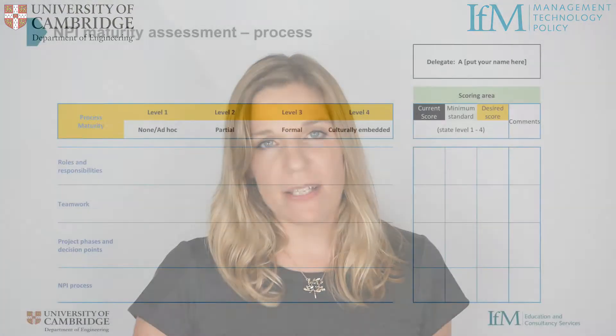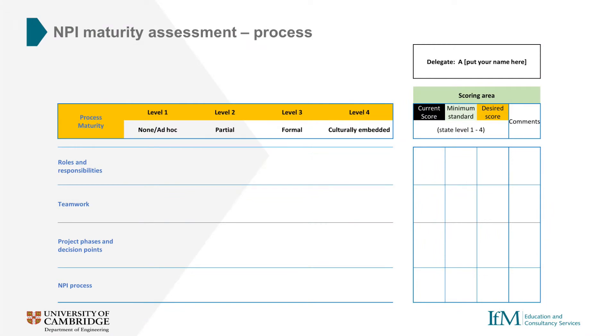We've separated each of the four P's into components which can be used to better form an assessment of our current maturity level. For example, for process maturity we can look at roles and responsibilities, teamwork, and project phases and decision points. We score each of these on a level from one to four and use scaling statements to help us better understand what each of the scores mean.